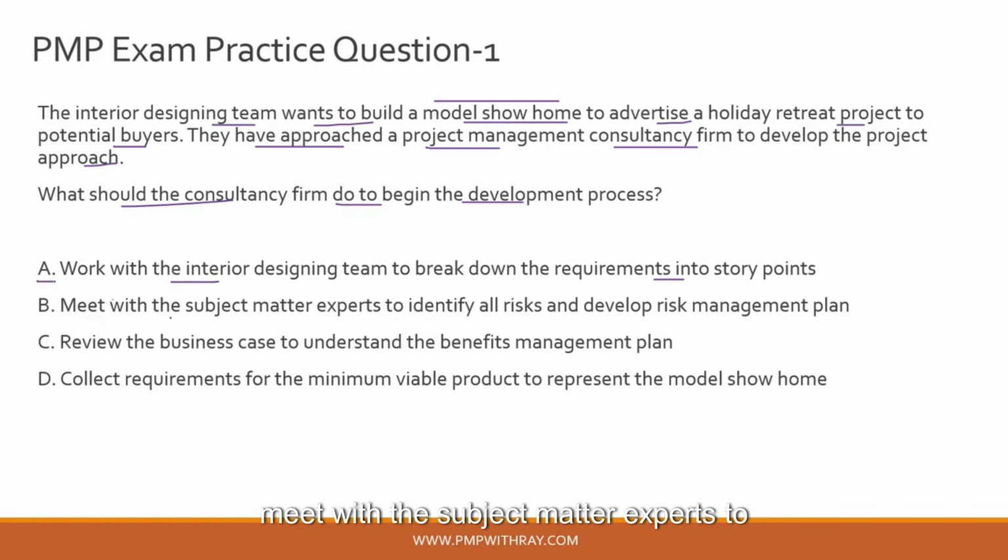Option B, meet with the subject matter experts to identify all risks and develop risk management plan. Now this is an incorrect option, guys, and we can eliminate it straight away. This is primarily because it is a very generic statement, and identifying all of the risks at the beginning of a prototype product is not a very sensible or reasonable approach. Primarily because of this superlative 'all', we can eliminate this option because it is not feasible to identify all of the risks at the beginning of a project.